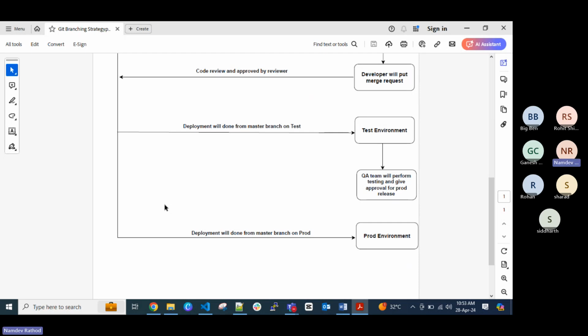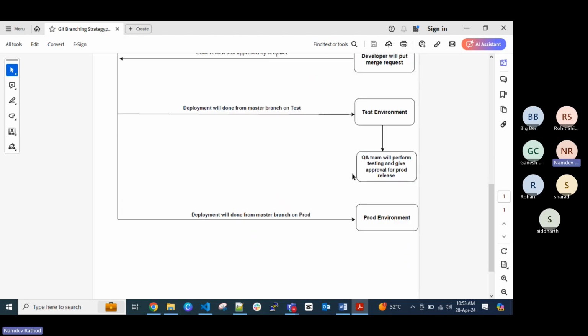It again differs from project to project, how they maintain the production release process. But I am just explaining the generic way. Then there will be a production release cycle. If you are dependent on other teams, then you need to inform them that you are doing the deployment, because they might get an interruption in their applications if they depend on yours. Then you will do the production release.